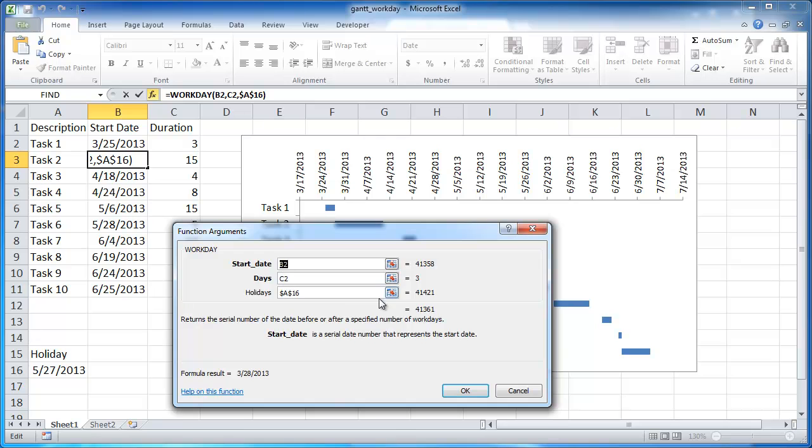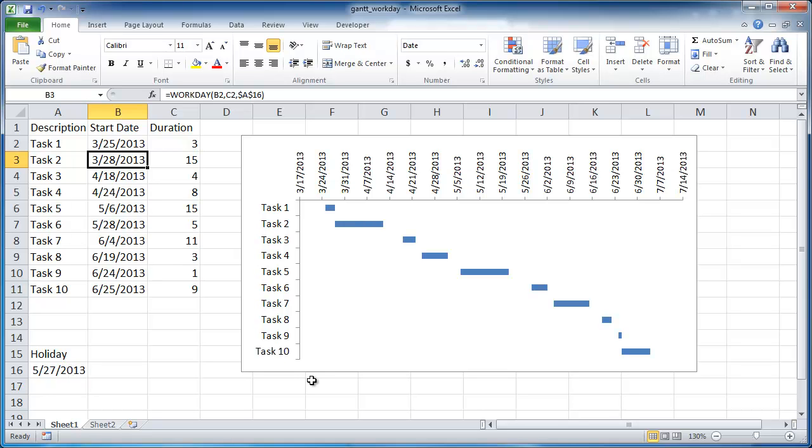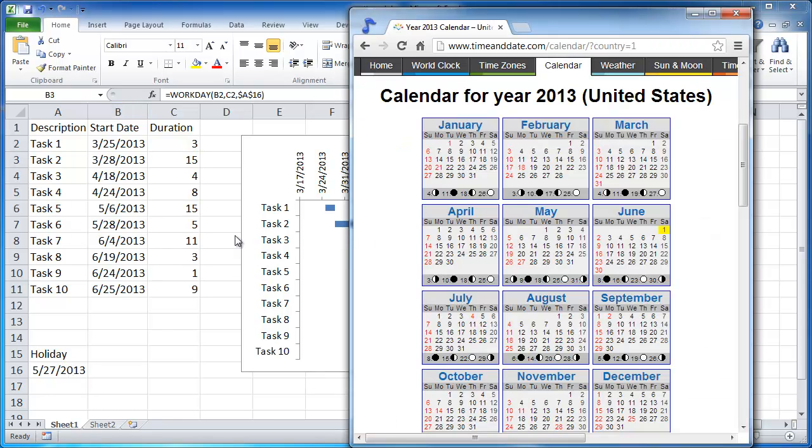Basically what we've done here is it's added to the 25th, 3/25, and you added three days it would be 3/28. So where the weekend comes into play, you can see here. Let me go ahead and describe the holiday and weekend. We have a holiday here on 5/27, so I'm going to go ahead and bring up a calendar. With 5/27 it basically impacts between task 5 and 6.